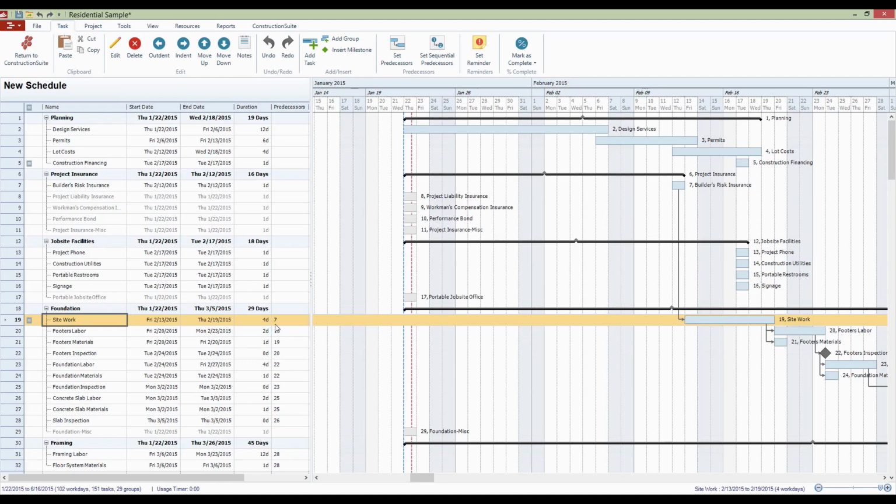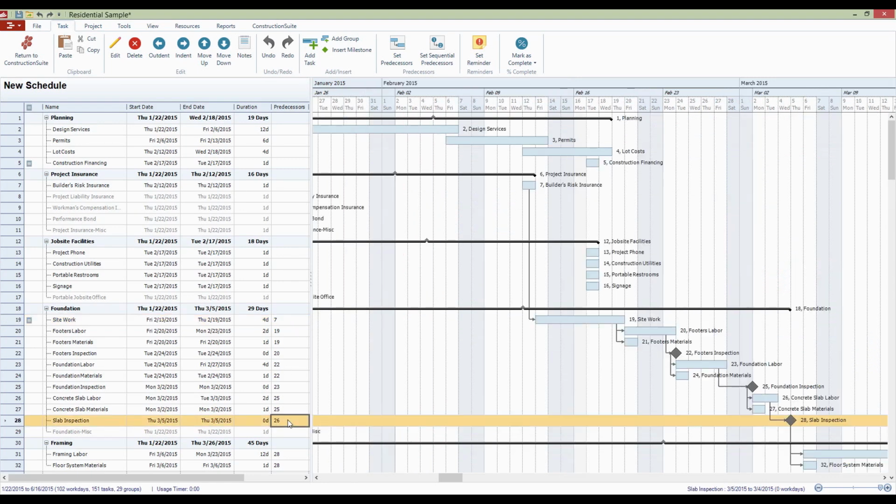This, on the task side, is represented using those task IDs. On the Gantt chart, it would be represented by the connection arrows here. So you'll see those coming through, kind of linking all of these different tasks together, or tasks to milestones as well. And that's where most of this information is going to chain in. For the predecessors themselves, you can always add in several predecessors as you need to. You just separate them all out by a comma.